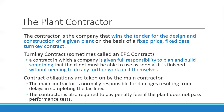A turnkey contract — sometimes called an EPC contract or engineering procurement construction contract — means the contractor delivers the plant to the client ready to operate; you just turn the key and it works. The deliverable is to design, build, commission, and deliver the plant in working condition ready for operations. It's a contract in which a company is given full responsibility to plan and build something so the client, the SPV, can use it as soon as it is finished.